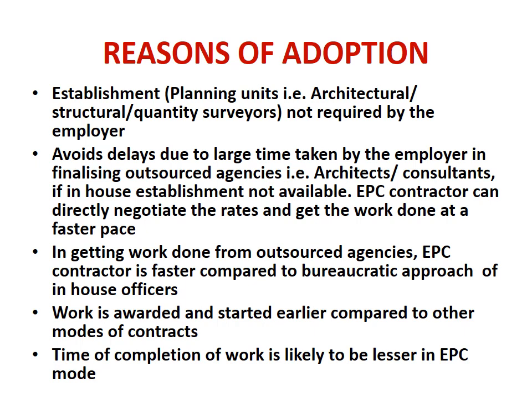Second, it avoids delays due to the large time taken by the employer in finalizing outsourced agencies. Suppose some organization does not have architects, structural engineers, and quantity surveyors with them, then they will outsource this work to outside architects and consultants, if an in-house establishment is not available.